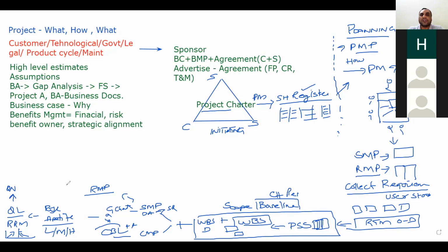In passive acceptance, we let it go, and we think that whenever the time comes, we will deal with it. So we will fund it from management reserves, and the action which we will take is called workarounds. When we are implementing the risk response, it is also possible that because of this risk response, a secondary risk can arise. So you have to be ready for it.